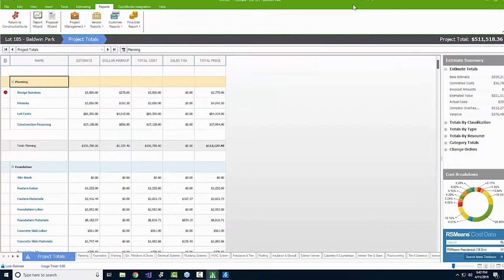Now, along those lines, as we start to dive into some of this additional information, going from the accurate estimates and all these percentages, the next question, I'll call it point number 3, is going to be the next most important thing you can do with any of your estimates. That's job costing. So I thought it was going to cost this much money. How much did I actually spend? Did we make enough money on that to cover that spending? Do I need to adjust my estimate moving forward because I spent too much? All of these questions come up constantly.